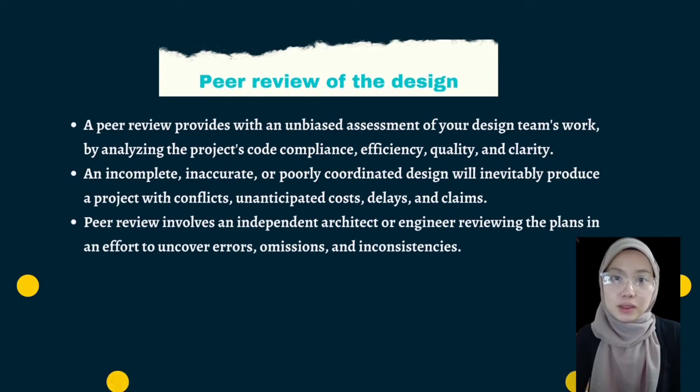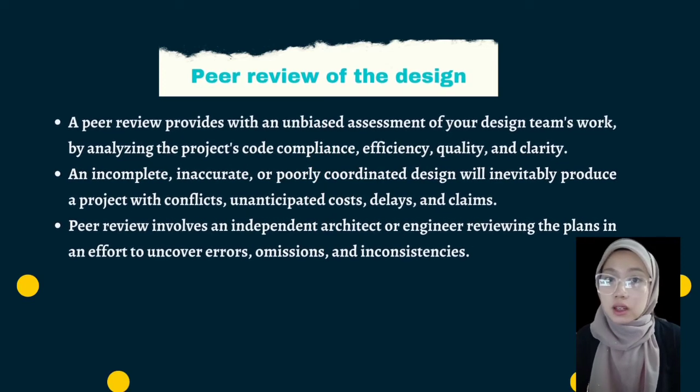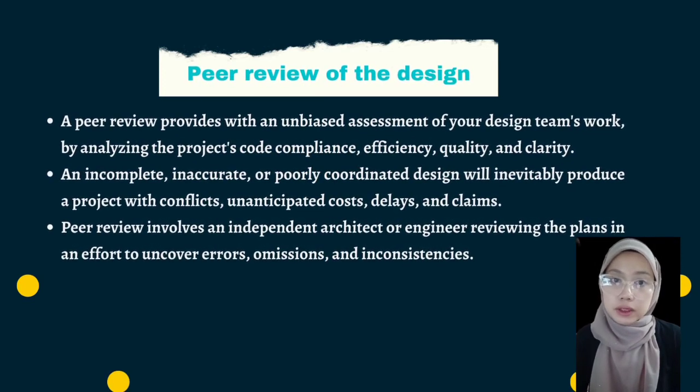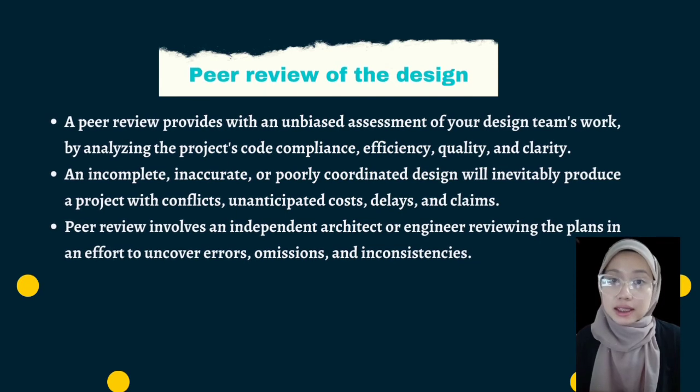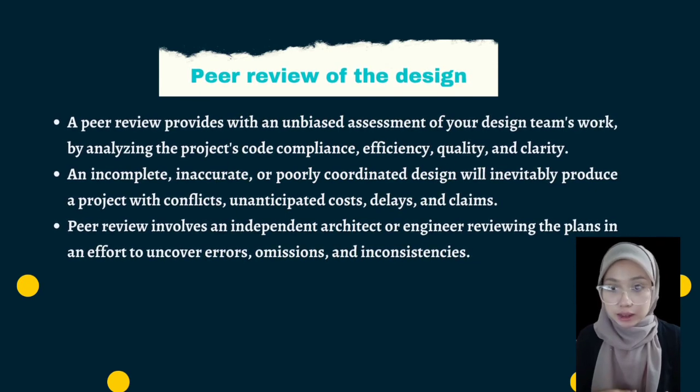Last but not least, there is peer review of the design. A peer review provides an unbiased assessment of your design team's work by analyzing the project's code compliance, efficiency, quality, and clarity. An incomplete, inaccurate, or poorly coordinated design will inevitably produce a project with unanticipated costs, delays, and claims.